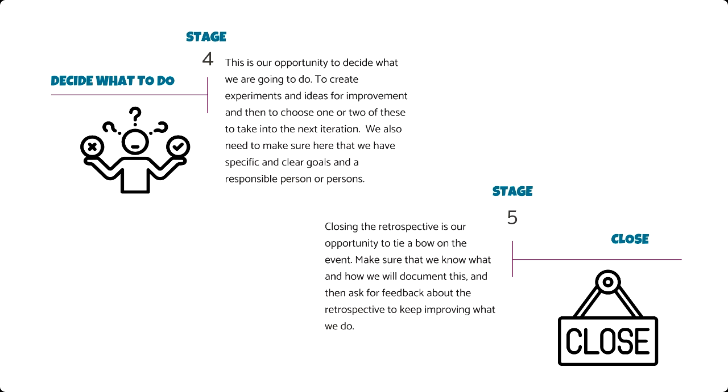And then finally, when we close, we want to recap: what did we decide? Who's doing it? Thank everybody for their time, because I think appreciating each other for our time investment is also so valuable. And then ask for some feedback. What could make this retro better?